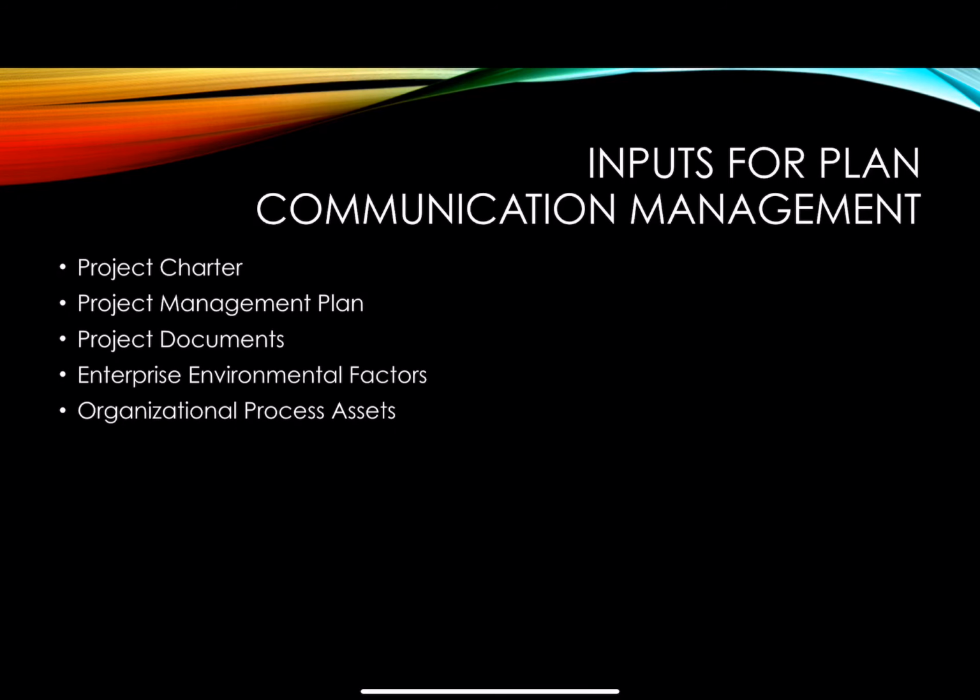In order to create the planned communications management document, we need to first assess and analyze the project charter, project management plan, previously created project documents, enterprise environmental factors, and organizational process assets. This is necessary in order to gather the relevant information needed to satisfy the requirements of this document. These documents and factors create a clear picture of what needs to be distributed to who and when, how we can and will distribute them, as well as other important project related information.